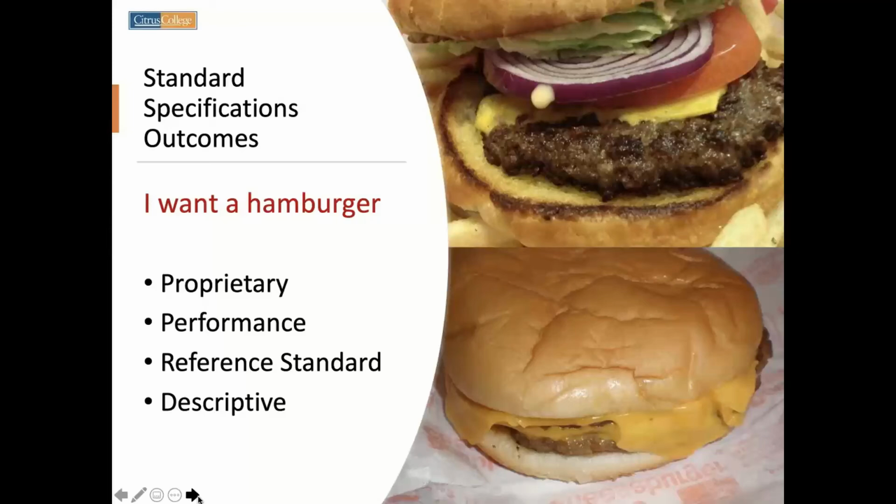We would probably get a question regarding public contract code or on the or-equal side. And normally what we would say is that it's either been board approved to be specified as proprietary, or I have a certain percentage of those items on campus that would deem it acceptable via PCC to be a proprietary spec. So just an example of the importance of the standard specifications.